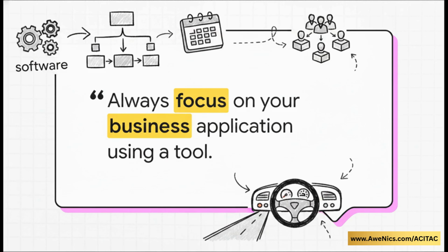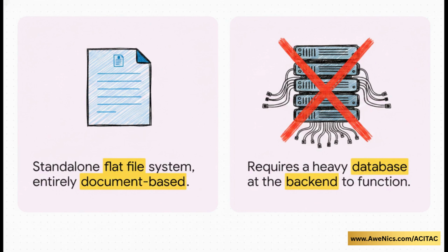So what's really fascinating to me is the technical foundation of how MS Project actually handles your data. If you've ever used heavy enterprise tools like Primavera, well, you know they usually require this massive, complex database running in the background just to function. But Microsoft Project, the standalone version, is completely different. It's actually a flat file system. It is entirely document-based. And what that means is, every single time you create a new project, it's generating a totally separate standalone document right there on your hard drive.